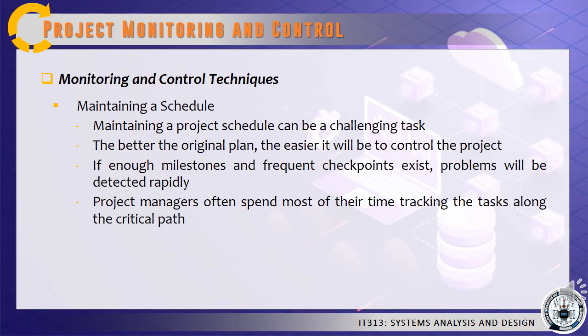However, for example, suppose that a task not on the critical path takes too long and depletes the allotted time. At that point, the task actually becomes part of the critical path, and any further delay will push back the overall project.